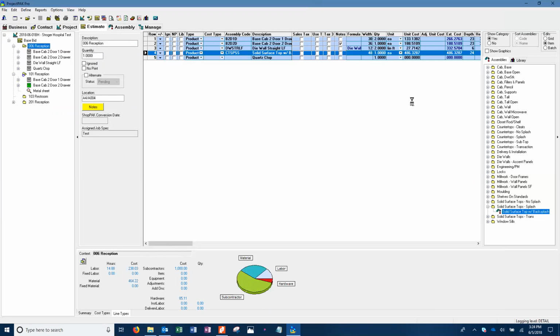Mhm. So you would actually need to pad that product and bring in additional material so that you are getting the right amount. Now, you don't necessarily need more labor to manufacture it. You could certainly have left it as 196 foot if that's your normal piece that you're going to buy. But if it's not, and you know you have to buy that additional, you would open up that product. And you can open it up pretty easily.